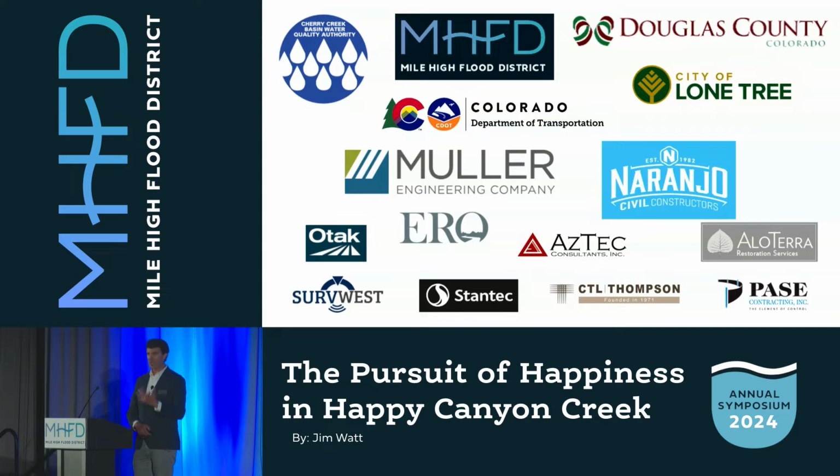We've definitely had a big contribution to push this through the design phase and do a decent job at value engineering the project to get to a solution that was unique but also affordable. Definitely want to thank ERO for their wisdom and their guidance through the 404 permitting process. Mueller for helping us out with the CLOMR application. It's always a challenge. And definitely very thankful for the guys at CDOT for helping us through the CDOT access permit. It turns out they don't allow just anyone to work next to an interstate, so glad that they let us in there. And then finally to Naranjo for what was a rather smooth construction phase.